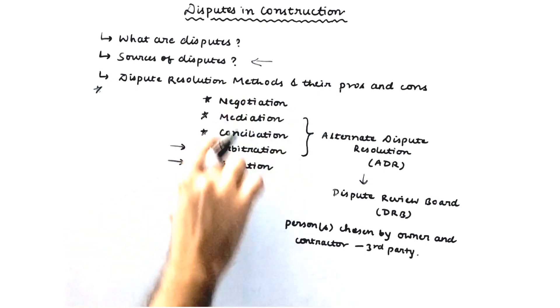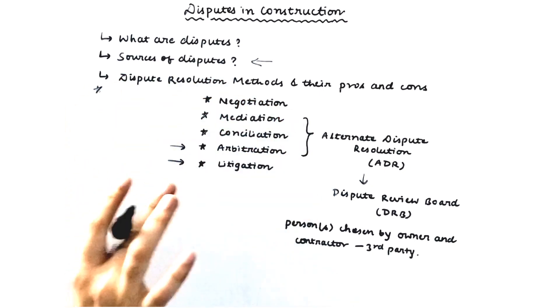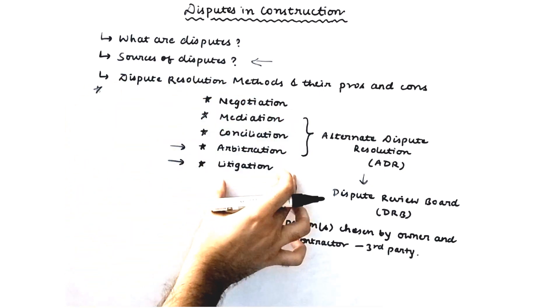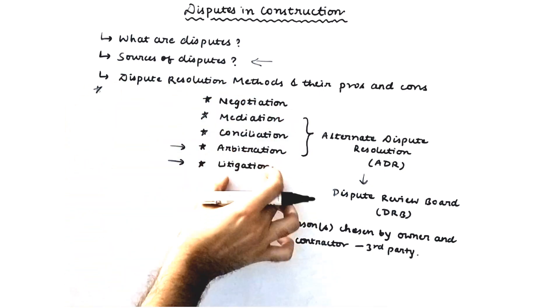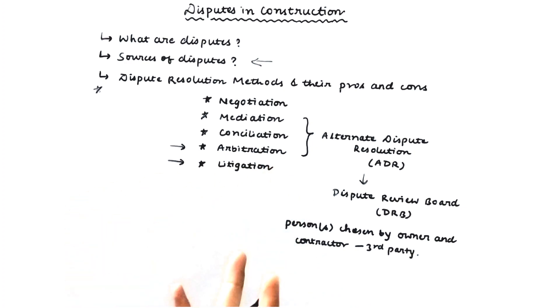It is called alternate dispute resolution because litigation usually takes place in a public forum — courts — whereas mediation, conciliation, and arbitration are kept confidential and are not discussed in public platforms. That is why these are called alternate dispute resolution methods, as compared to litigation which is a direct, formal method involving a panel of judges.